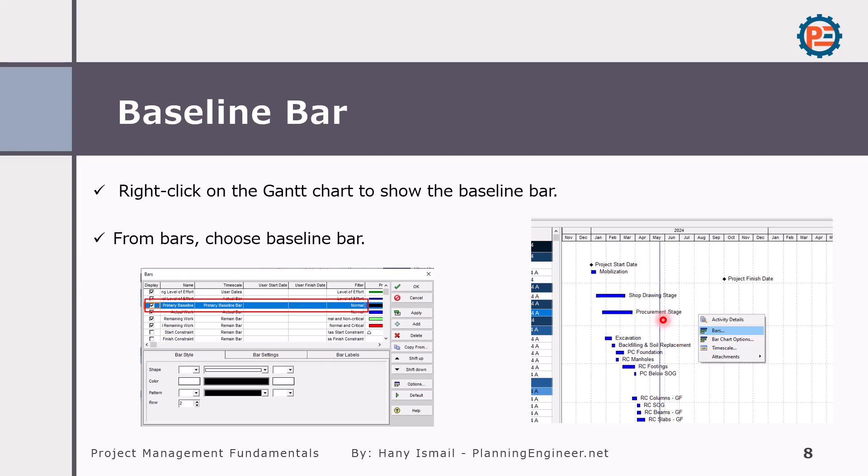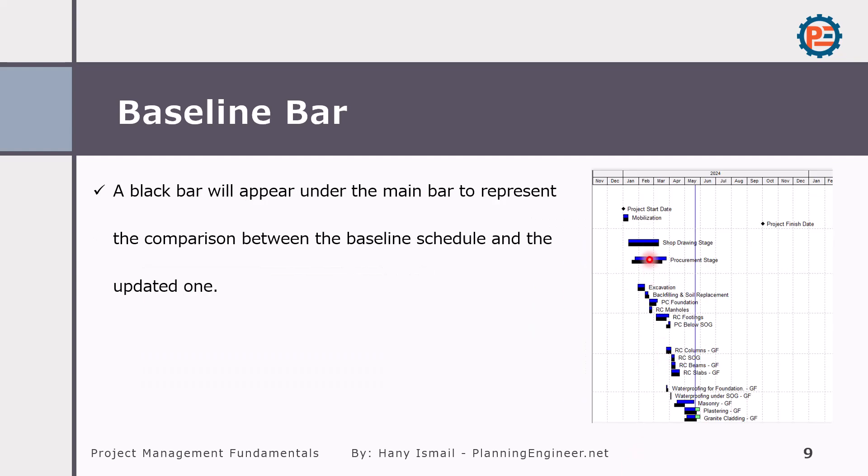I prefer to have it as black so it will not be confusing. Whenever you see something black here it means this is your baseline schedule, and the other colors are your updated schedule. So the black color will appear underneath the red or blue color.